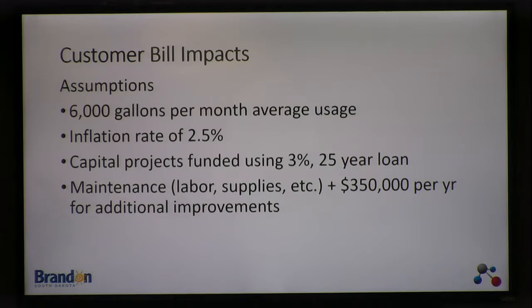Inflation rate of 2.5% is assumed across the 25-year time. Capital projects funded at 3% using a 25-year loan. It's a reasonably current value of the SRF. If you choose to use a different borrowing technique, bonding and so forth, you would have a different value. But to compare these alternatives against each other, we assumed an SRF